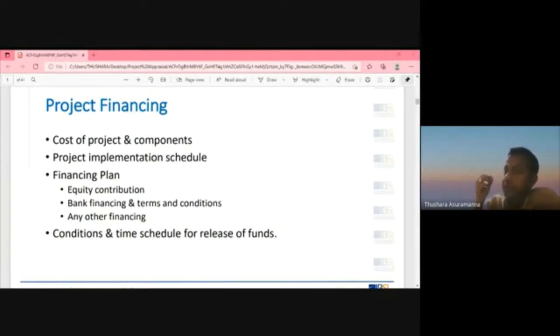Because it's critical, complex, long-term driven. So you have to do a step-by-step analysis before starting financing. That's one. A step-by-step analysis together with the budgeted or agreed activities, whether you have completed them, any lagging, I mean, what the revised timelines are and so on. So then the implementation is very important for the completion of the project. If not, you are unable to do it properly.